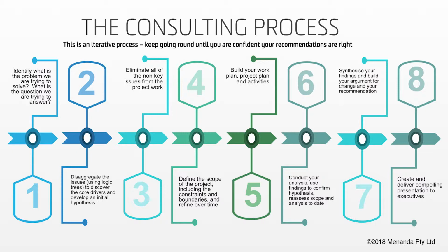Once you've then got your issues identified and eliminated those ones you don't need to focus on, you're ready now to start scoping out the project, which we will talk more about in a minute. So once you've scoped that out, it's really looking at what are the constraints and making sure you stick to that scope, because the last thing you want to do, and you'll hear a lot from us about this, is get scope creep, because you won't have the time or potentially the budget to address that additional scope that you may be faced. So controlling your scope in the consulting process is a very important step.